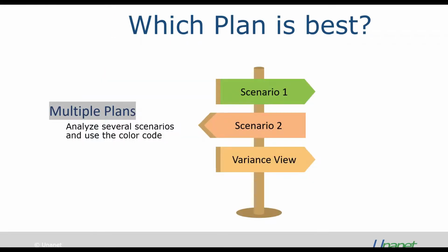So when we're looking as a project manager, we might want to look at different scenarios, or maybe when we get into the middle of a project, our customer comes back and says, hey, I need to add $100,000 to the project. What can you do for me? You might want to put in another set of plans and then compare that against your future one. And then, of course, we always hear that word about reforecasting, rebudgeting, and that multiple plan set is an option to do that for us within the system.